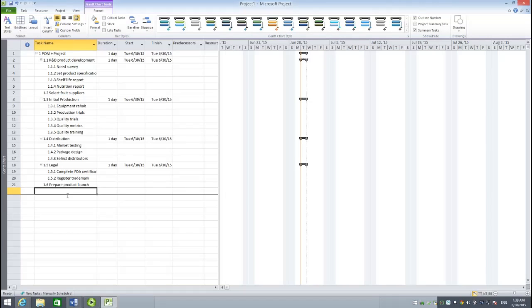The next step is to enter project activity durations according to the project requirement documentation. To do that, I would like to make sure all activities are scheduled automatically rather than the default manually scheduled.